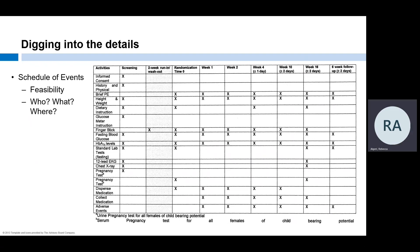Are there tests, procedures, questionnaires, or clinical assessments that are foreign to the study team or outside of typical practice? The example includes a urine pregnancy test—do we have appropriate point-of-care testing processes or will subjects need to go to the lab? For investigator-initiated studies, do we have an appropriate license or written permission from the author to use validated instruments or questionnaires subject to copyright? What skill set or licensure do we need? What equipment, materials, and facilities do we need access to? Where will study visits take place?